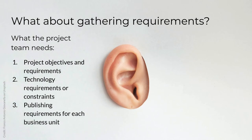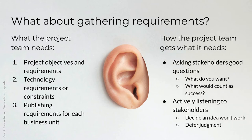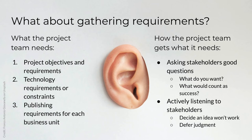It's worth emphasizing that in order to gather these requirements, team members need to ask stakeholders good questions. For example, 'What do you want?' is less likely to provide useful information than 'What would count as success?' Team members also need to listen carefully. Content strategist Christina Halverson says listening is the content strategist's most important job. If you've never actually practiced active listening, you'll be surprised how exhausting it is. Deciding the speaker has an idea that won't work while they're speaking is not active listening — you have to work at deferring judgment.